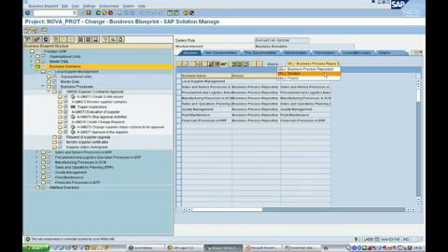You can also take a scenario structure directly from your solution database. After an implementation project or any other project has been completed, you can transfer the information from the project into the solution directory. This allows you in the future to take this information from the solution directory and copy it into a project. Or the other option is you can create the structure from a different project that you have within your project repository.